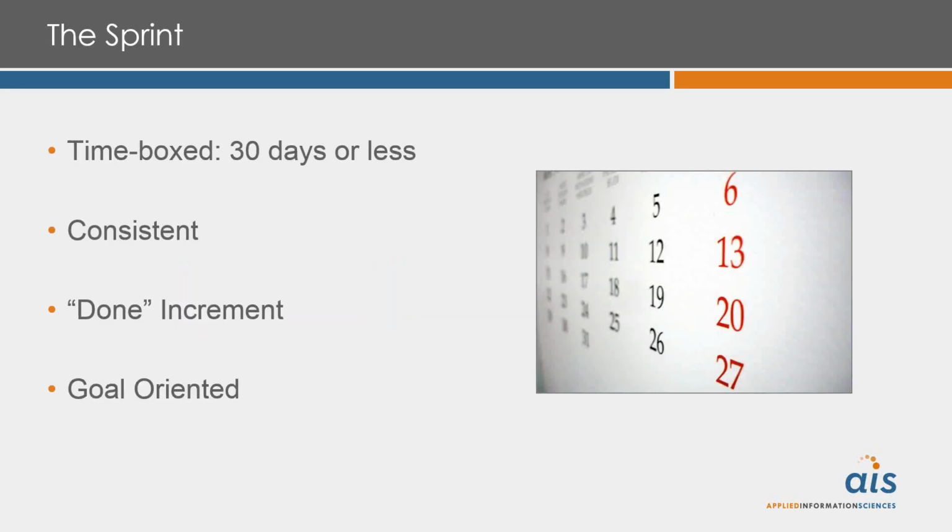There's a handful of Scrum events, but all of them exist inside this thing we call the container, the sprint. The sprint is a container for all of the other things that go on inside of Scrum or inside of software development. The sprint is time-boxed, and all of these events are going to be time-boxed. And what that means is that we have a duration of time decided early on at the beginning, and all of the activities that occur within that time box. So once that duration ends, once that time expires, the time box is over.